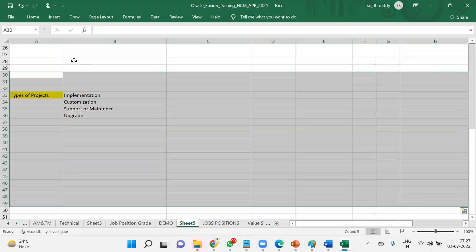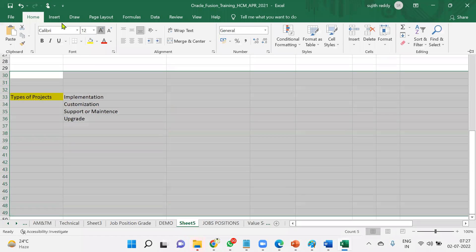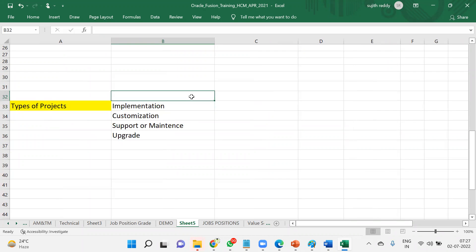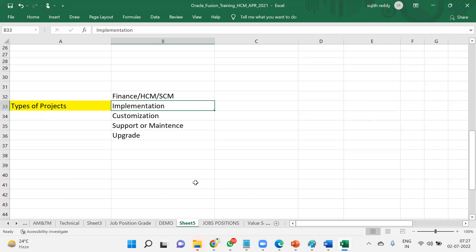First we'll discuss about implementation projects. What is an implementation project? This is common for all domains - whether finance, human capital management, or supply chain management. An implementation project is when your client is not using Fusion Applications so far - very first time the client is going to use this application. Whenever you are doing this application configuration for your client, we call it as an implementation.